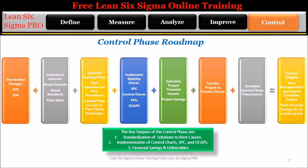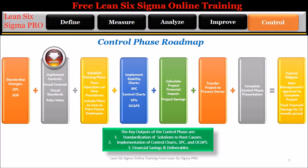The Control Roadmap is a summary of all of the steps required to complete the control phase. Step 1: Standardize changes — the team will create one point lessons, OPLs, and update or create standard operating procedures, SOPs. Step 2: Implement controls — create visual controls, visual standards, and poka-yokes.